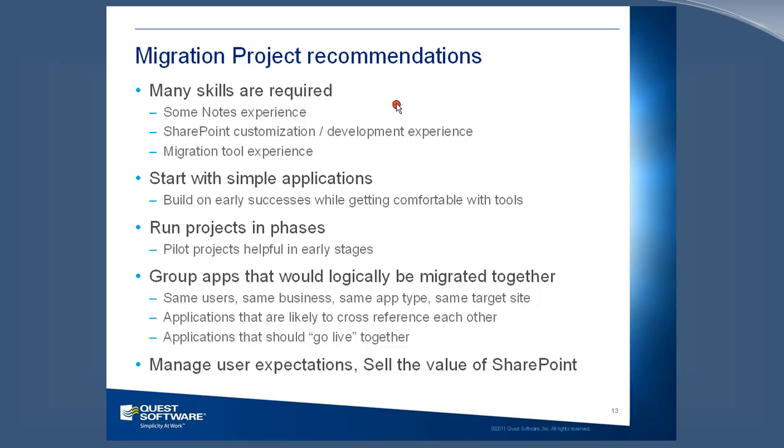If you're new to SharePoint, if you're new to Notes, don't base everything on the learning curve. Don't say, well, it took us 2 weeks to do the first application because we were learning so much along the way, and so we're going to multiply that out by 500 applications. Take the hit of the learning curve yourself, and don't make that part of your customer estimates, and don't multiply that out, because it will get a lot faster when you do number 5 and number 10 and so on. You'll find that you get the hang of it and things go a lot quicker as you go along.